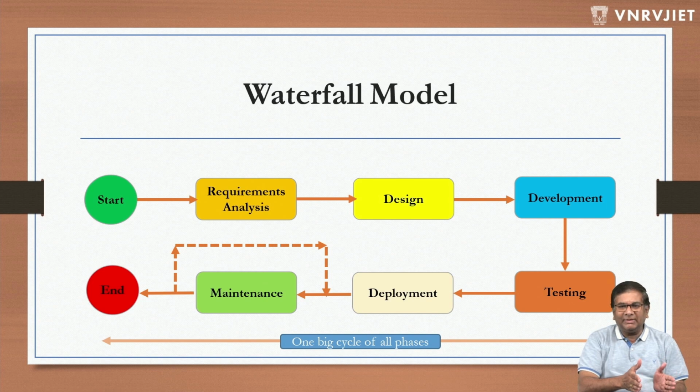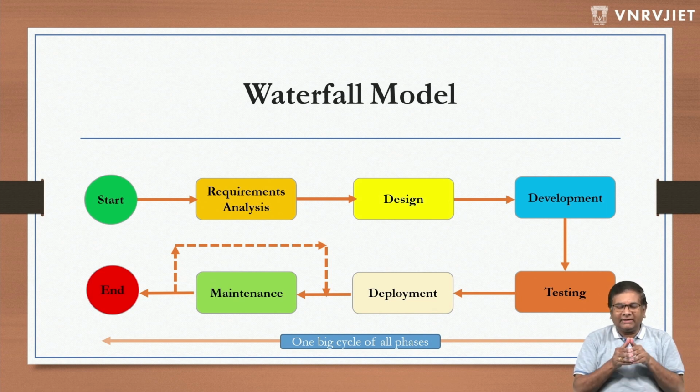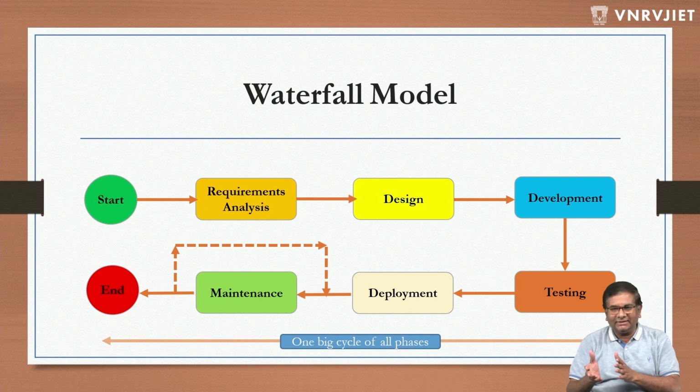Now the SRS document is given to the designers. The designing team consists of a single architect or multiple architects. They go through the SRS and divide it into the various software modules that need to be developed, and they prepare a high-level design document. This high-level design document consists of the architecture they are planning to go with, the programming language or languages they are going to use, and the tools and technologies, and they give justification for each and everything.